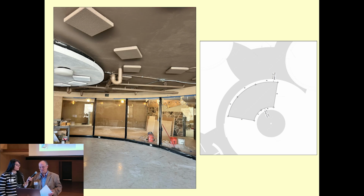So the owner sent this photo to me. We hadn't talked through this quite yet, and as the other owner said to me, she says, when I saw this, I had a heart attack. And I was like, yeah, I kind of know the feeling. But what we did was, and I always recommend this with any project, show your cards to Park Service. We ended up having a conversation with Paul Porter and Liz Petrella about the best way to deal with it, and came up with this idea to soffit just the pipes in this room.